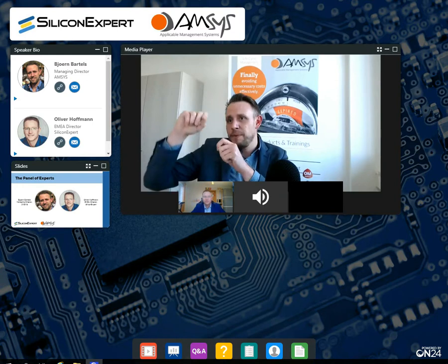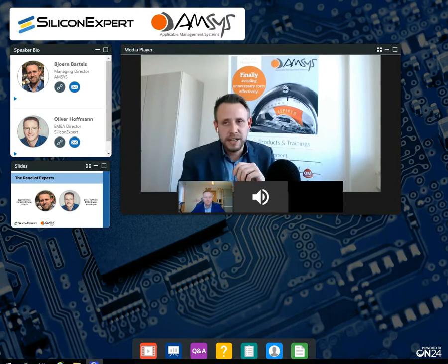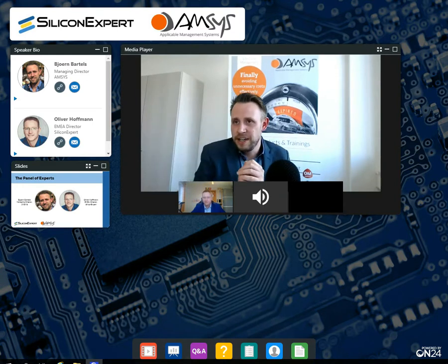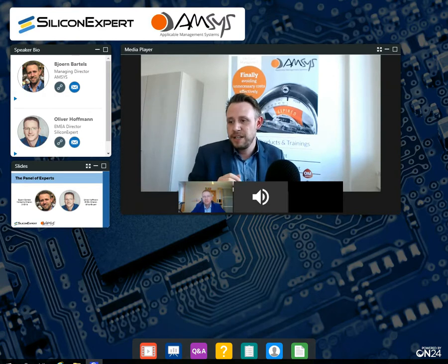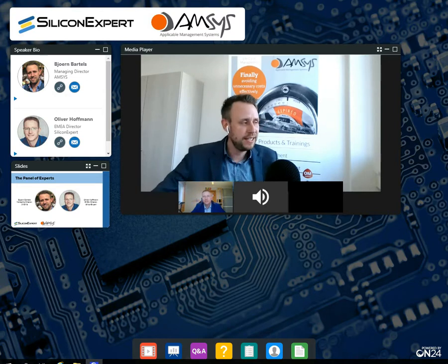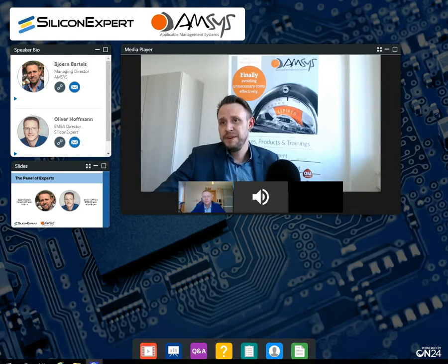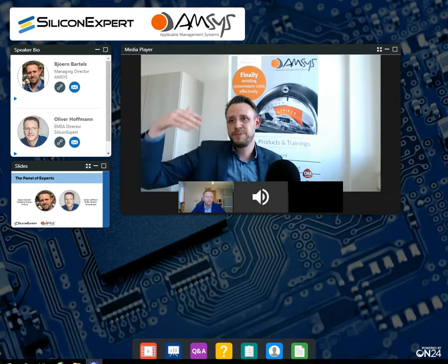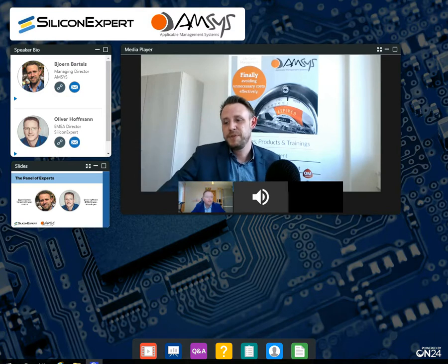Hey, I'm going to stock up here a little. I'm going to choose an alternative part here. I will not do anything here, and so on, because this is covering a lot of workload. And there are studies out there on how you can strategically optimize your redesign planning and then dedicate resources at a specific point in time to solve a lot of obsolescence issues with only one engineering effort.